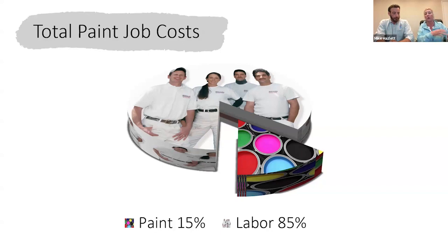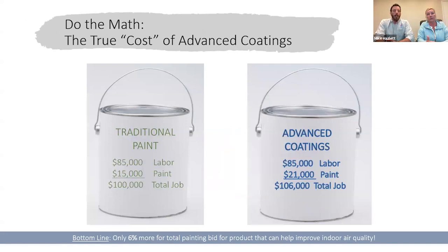You have one crew pressure washing, then you've got a crew following behind priming, and then a crew following behind painting. So your job moves much smoother. So there's a lot of things to take into consideration with that. Yeah, especially at this point we see in the markets with insurance and all that too. I mean, that all takes effect on that bid.